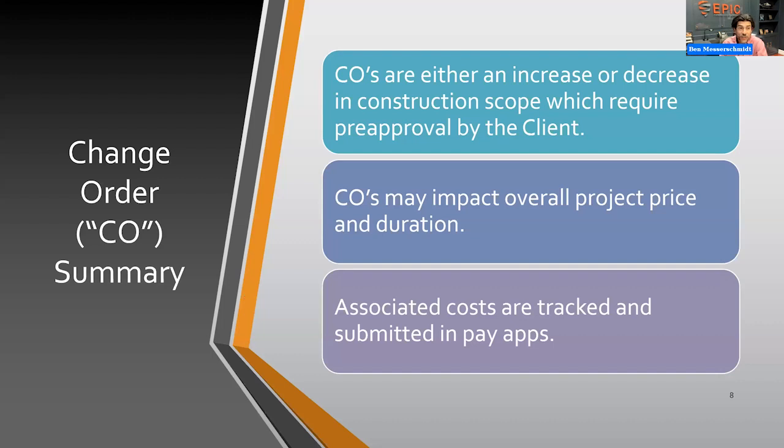Now, moving over to change orders. So you're actually in the throes of construction right now. You signed the contract and have already been working on that. One thing I do want to make mention of, with respect to the contract and how the plans tie together: I am a strong proponent of having the plans actually included as an exhibit within the contract. The reason is that it gives the inspecting engineer or inspecting designer way more teeth to say, okay, this permit set is part of your contract, XYZ contractor,